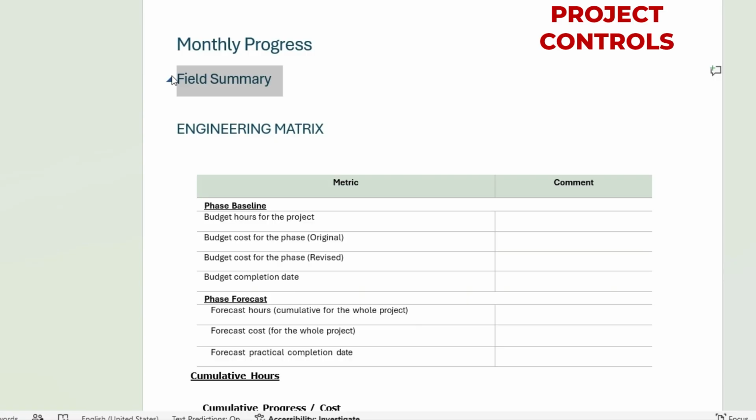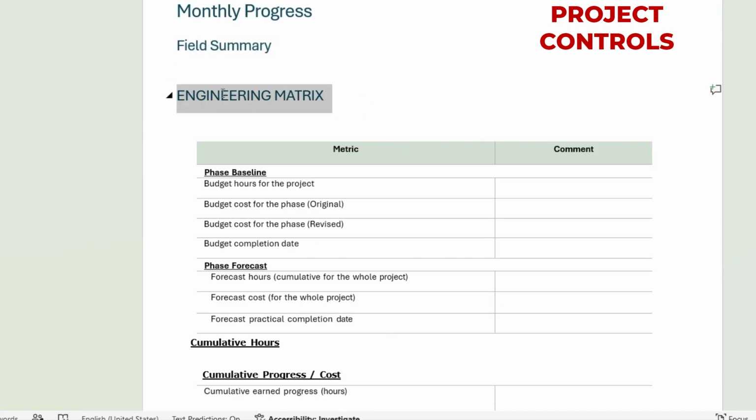For example, you need to do 10 surveys and you have completed 9, so you need to prepare a kind of summary. It should not be too wordy. You just have a metrics table like total, done, pending, with client or with your company, and what the reason is.